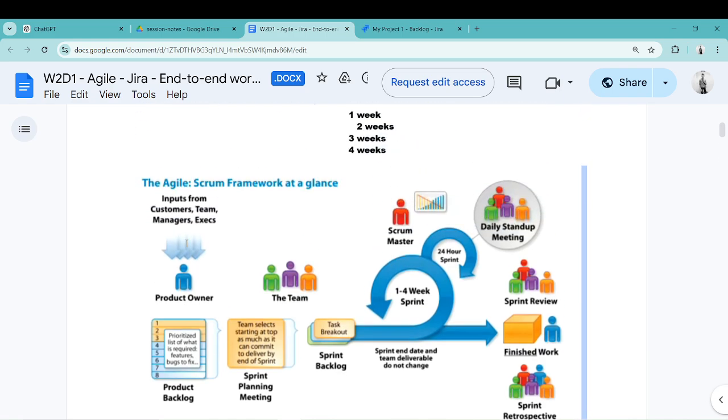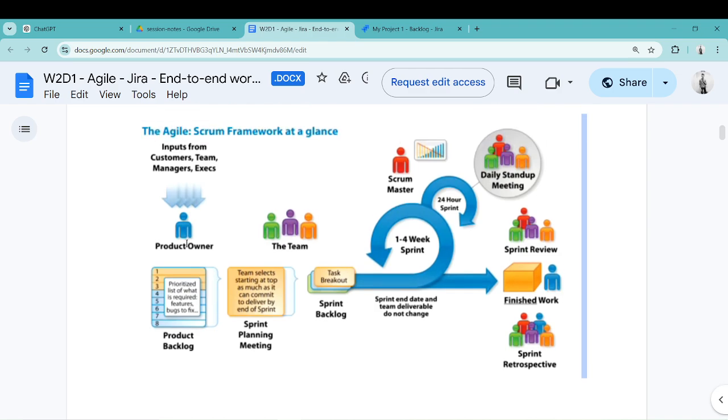So we have discussed that a sprint may be 1 to 4 weeks, meaning it can be 2 weeks also. Before the sprint starts, the grooming meetings happen. In these meetings, the team discusses requirements and estimates story points. Then sprint planning happens; in this meeting, the team defines features and allocates the tasks.